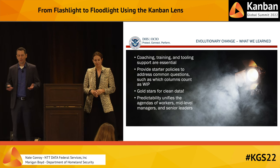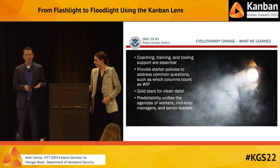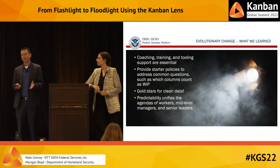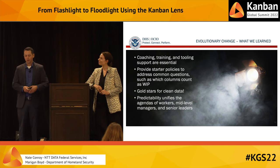Well, coaching, training, and tooling support are essential. Providing starter policies to answer common questions, such as which columns count as WIP, was really important. We gave gold stars for clean data. We do need accurate information in the system. That goes right up to the senior leader agenda.